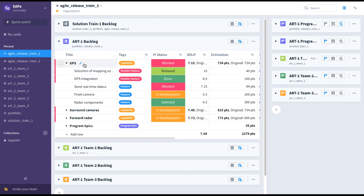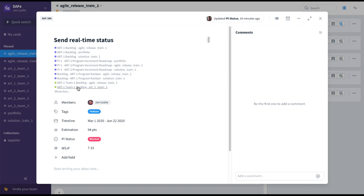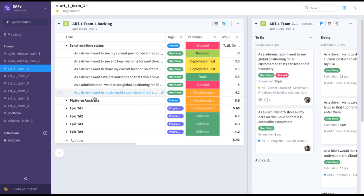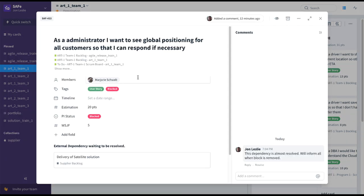GPS is being driven at the ART level, so we go to the ART1 backlog. We can see that GPS is blocked there and broken down into various features, and real-time status happens to be the blocker. Clicking on 'Send Real-Time Status', we can see via its relations that this is being worked on by ART Team 1 and it's in the ART Team 1 backlog. Going there, we've now gone all the way from portfolio level down to the team level. We can see that 'Send Real-Time Status' is indeed blocked, broken down into user stories. The user story 'As an administrator, I want to see global positioning for all customers so that I can respond if necessary' is blocked by an external supplier, and the product owner or scrum master is already on it — this dependency is soon to be resolved.